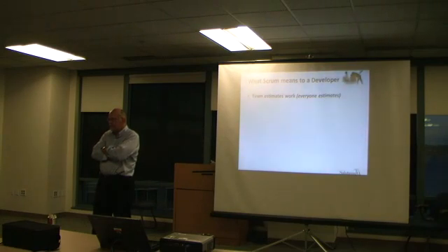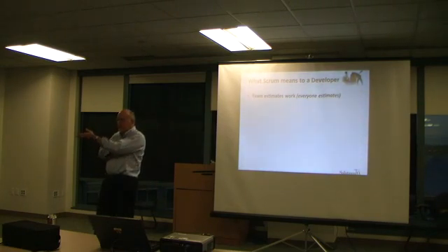You have financial limits, you have user limits and things. It's the tracker that's converting these story points into time, not the developers. And if the developers are trying to change that at the same time, you're trying to solve a single equation by changing two variables. Yeah, that's right. Yeah, it is a challenge, and it's a huge challenge.